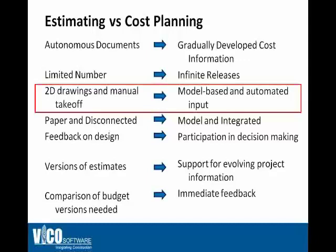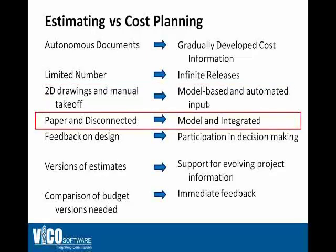In 2D estimating, the quantity takeoff is manual or semi-automated — it is a difficult process. The 5D cost planning approach uses model-based automated input, complemented with manual entry when necessary. The construction-caliber quantities derived from 3D models drive not only the 5D cost plan but also the 4D schedule. With paper-based cost estimating, your input is disconnected from the design. The model in 5D cost planning provides direct visual feedback for any selected cost item, so the interaction with the design and understanding where cost is coming from is much better.